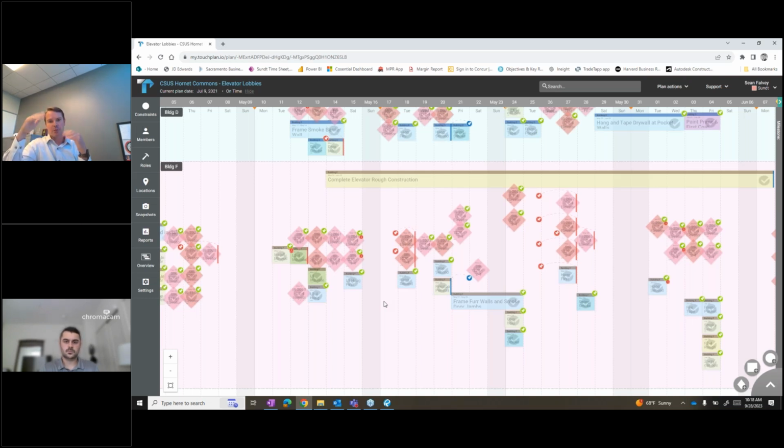And so without needing to have a conversation, it became a quick ability for us to just go, all right, let's look at what it is. It's 3:30 on a Wednesday. At 3:30, our tradesmen know, hey, I need to have my activities updated by that time, because that's when Sundt's pulling the status. And by 4 o'clock, our guys are out walking the job, QCing it. By 4:30, we've got a full list for the inspection team, and that goes in. And they know that, hey, this is what's on the docket for tomorrow.